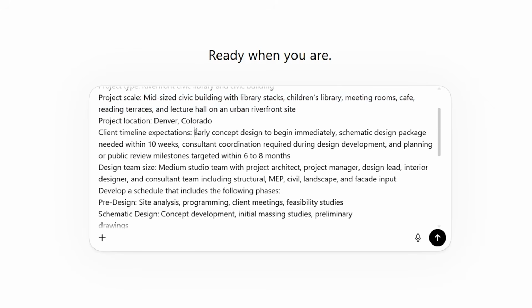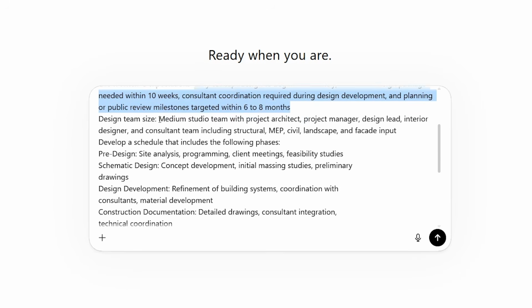Client timeline expectations, schematic design packages needed within 10 weeks, consultant coordination required during design development, and planning or public review milestones are targeted within 6 to 8 months. The design team size: a medium studio team with project architect, project manager, design lead, interior designer, and a consultant team including structural, MEP, civil, landscape, and facade input.